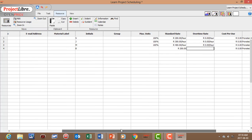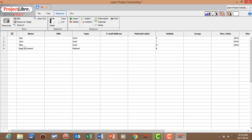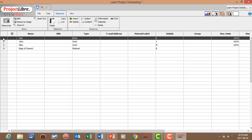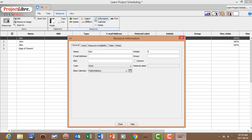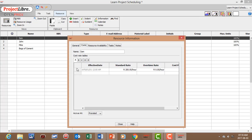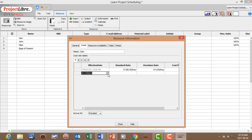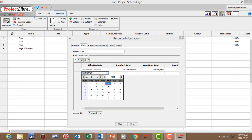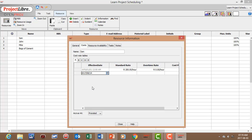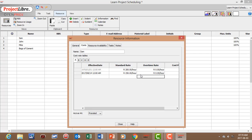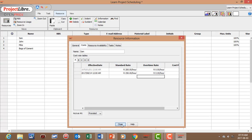We're also going to add a rate change for SAM. Go to Resource, Information, then Cost. We stipulate that SAM's standard rate is going to change from the 14th of August — SAM got an increase — and his new rate is 250 Rand per hour.